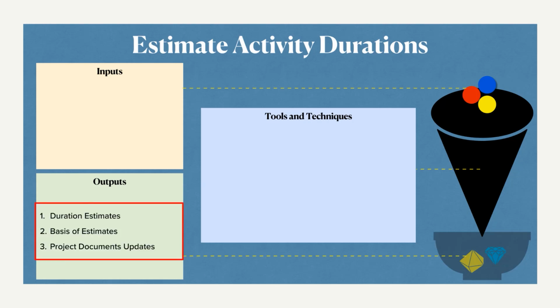Duration estimates. The time estimation of each activity is this task. Like, activity A can take 3 weeks, plus or minus 3 days. And not just plus or minus 3 days; we should also mention the chance of success or the chance of not succeeding. All those things are captured here in the estimates.